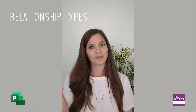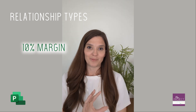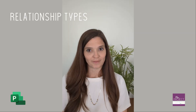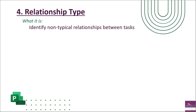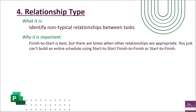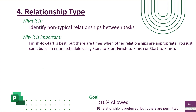You use these relationship types interchangeably. Finish-to-start is the default and preferred method; however, DCMA allows up to 10% of your tasks to have relationships other than finish-to-start. This metric identifies non-typical relationships between tasks. DCMA understands that other relationships are sometimes appropriate, but you shouldn't build an entire schedule using start-to-start, finish-to-finish, or start-to-finish — that's why this metric exists.